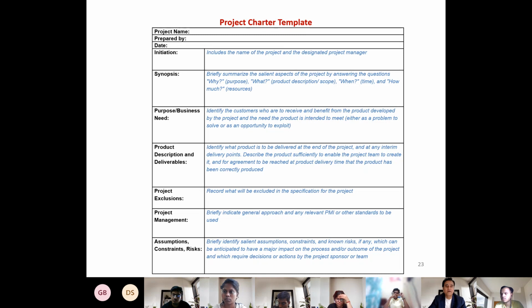What is relevant here is something that people might misunderstand as included. So think of what can be misunderstood to be included, but is not part of the project. Write those down. So can you brainstorm? Can you talk between each other and think aloud about what can be excluded here?